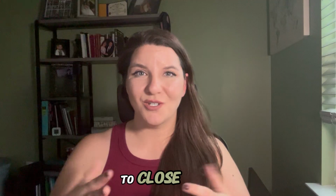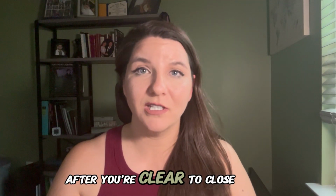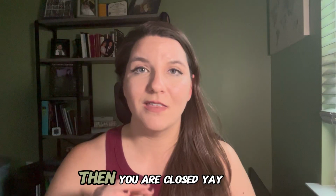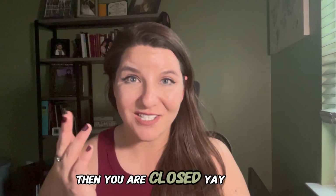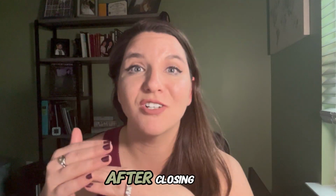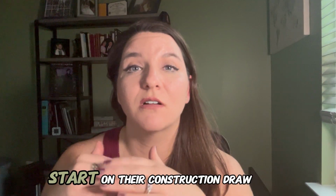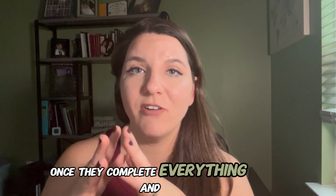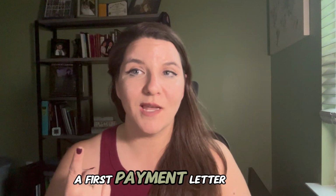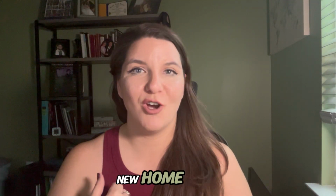And that means you get to close, which is super, super exciting. After you're clear to close, your scheduled closing is usually going to be at least 3 business days after you're clear to close that you're actually signing the paperwork. Once you sign the paperwork, then you are closed. Yay! You're not done there. That is when the construction begins. After closing, your builder is clear to start on their construction draw schedule. Once they complete everything and you sign off on the final draw, that is when you get a first payment letter and the keys to your new home.